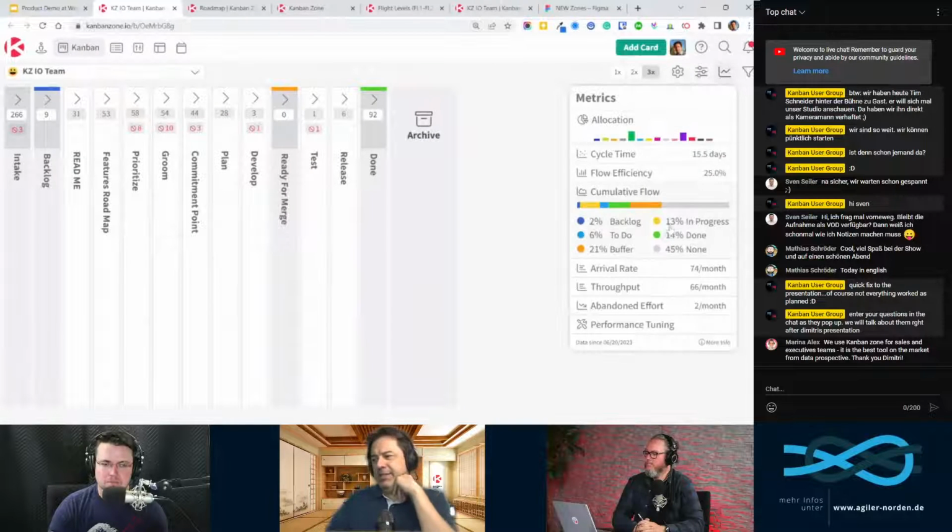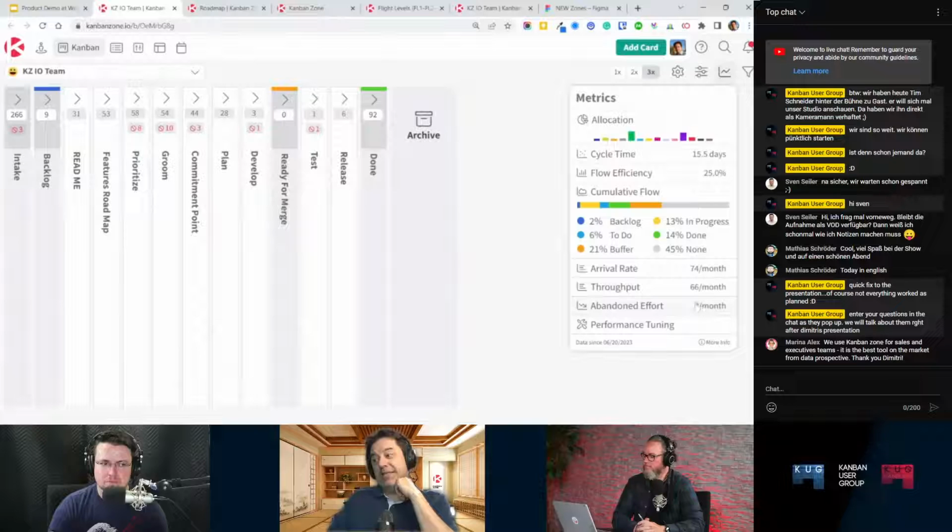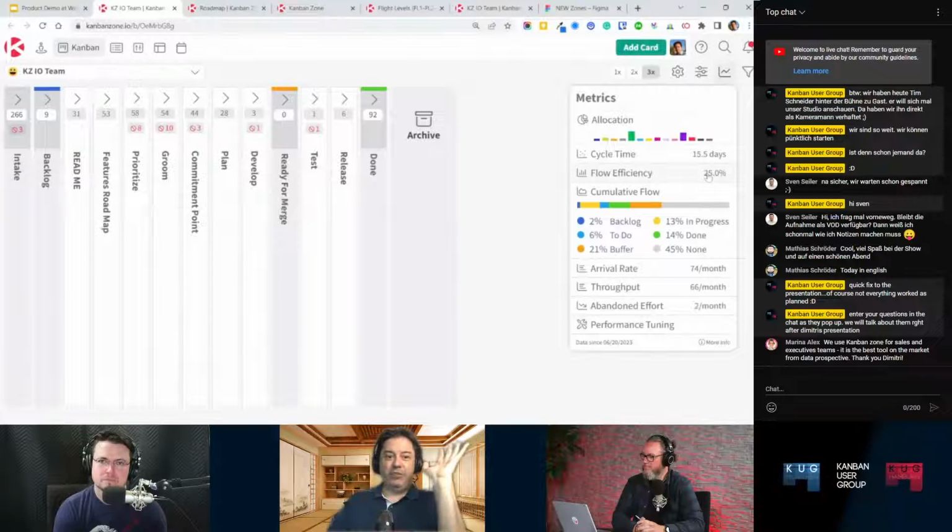So my data is coming in, and I'm doing okay. I'm delivering 66 cards a month, but I'm receiving 74, and I'm not abandoning very much. That's good information. My cycle time is around 2 weeks. It's not great, but it is what it is. And my flow efficiency is not great. So 25 is not great. It's not horrible, but it's not great.